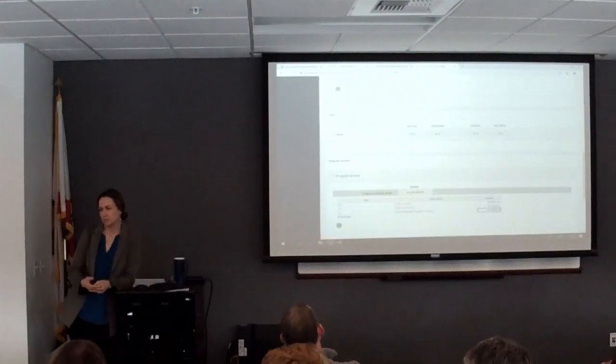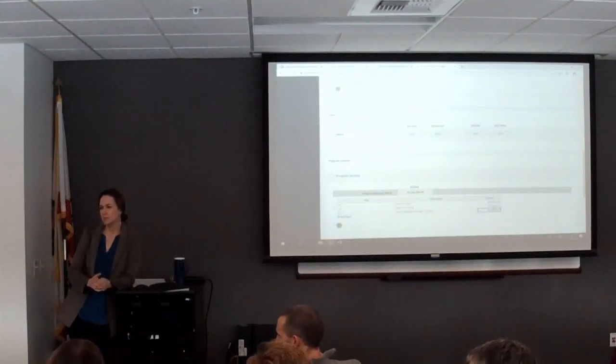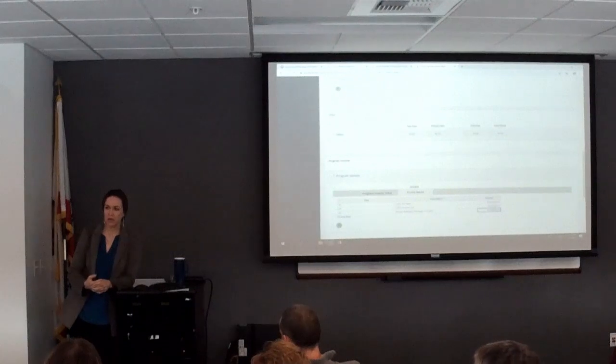Whatever, it's like, oh, well, it wasn't quite as much as we thought, so then what happens? When I have done these contracts in the past, I had my mandatory optionals. I required my contractor to bid on them. They told me what they were going to cost. I put them in the contract and then I conditioned them: if we receive funds, we will add these items to this scope of work. It's a done deal. You don't have to procure it. If the money comes in, it's already set up to do it. It's already in your resolution and it's already approved.